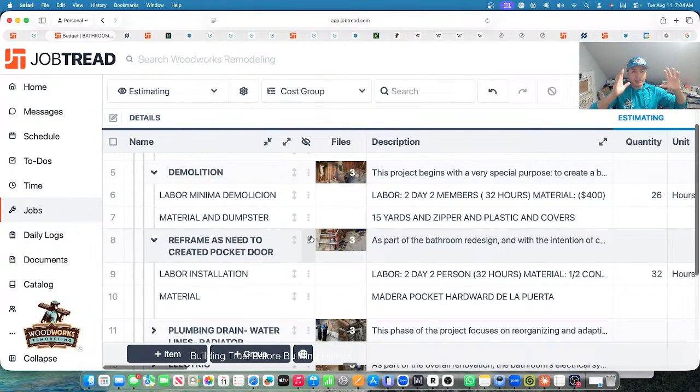On a project like that, it took 2 dumpsters, 3 dumpsters, and the weight of the dumpster, because of the plaster, the big tiles, the mesh, whatever it is, was that much. So we track all that information. Now when we do the next project, we know exactly how much things cost. Obviously we can be off a little bit, right? But we don't really know how much it costs until we track. Once we track that, then you know how much it really costs for the project. That way we don't overcharge you, we don't undercharge, because at the end, if we undercharge, we're not able to produce the work. So everything is being tracked.